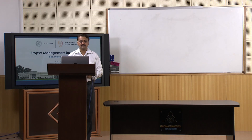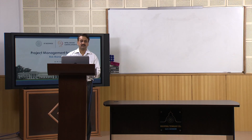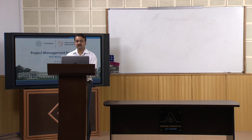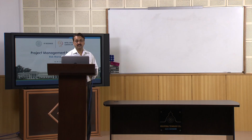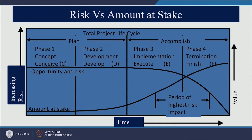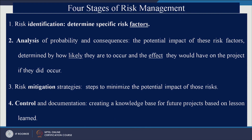As we saw in the previous class, you need to find out the probability of occurrence of an event which would negatively affect your project, and what would be the impact of that risk. So project risk equals the probability of an event and the consequences of that event. There are four stages of risk management: identify risk, analyze probability and consequences, risk management strategies, and control and documentation.